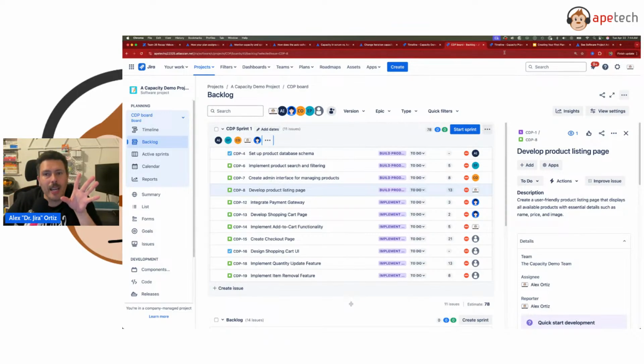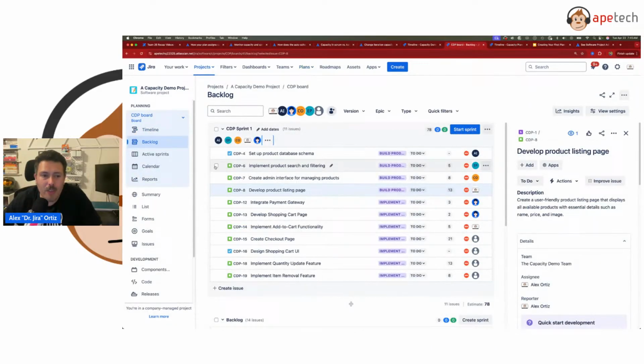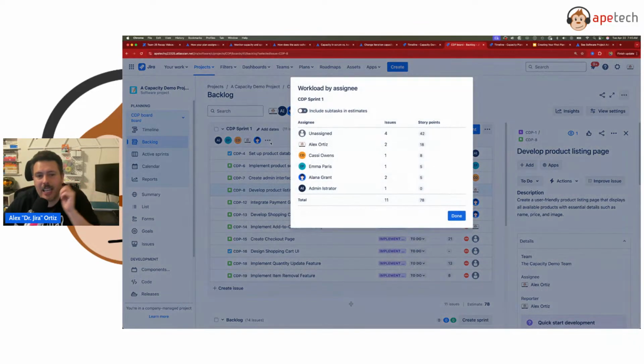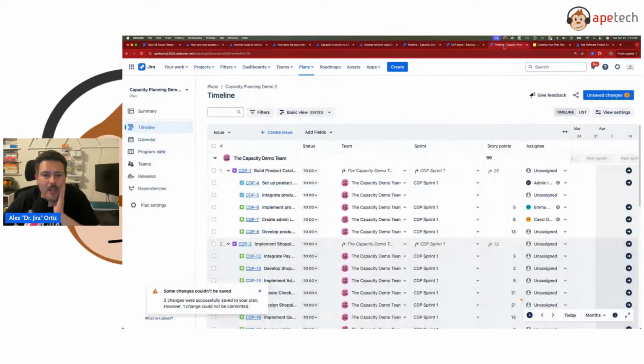Now, the only time that I think this makes sense is when you're managing multiple teams, multiple Jira projects, multiple resources that are just scattered all over the place. Because when you do that, you can pull in different teams and you can plan multiple sprints at the same time, then the plan makes a lot of sense to me, right? Because now the plan is going to give me an edge, because the limitation of this view is that the stories here can only belong to this project. And so that's kind of where the drawback is. So that's essentially what I wanted to show you.